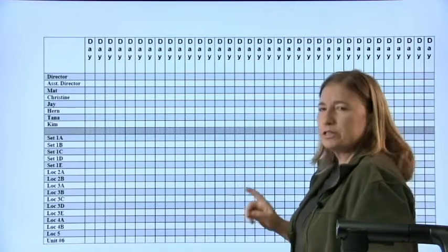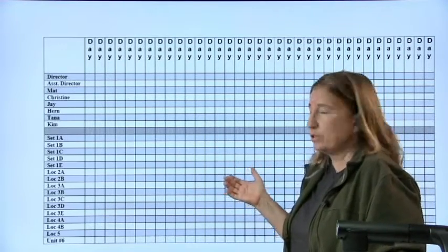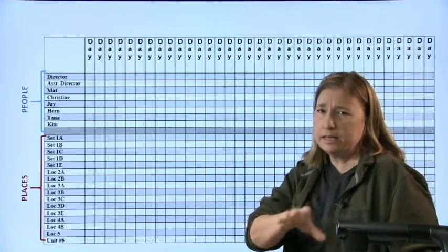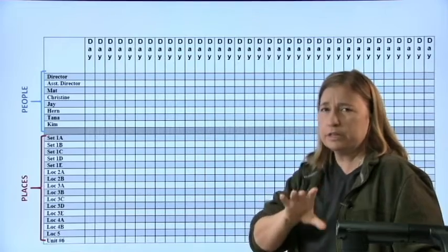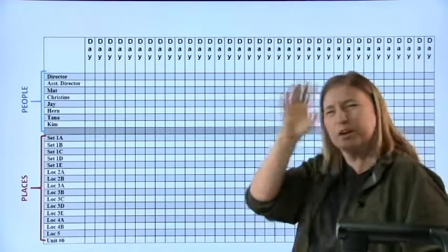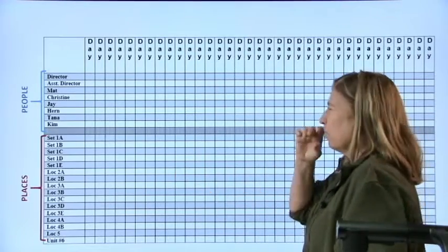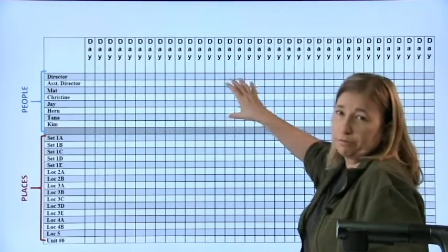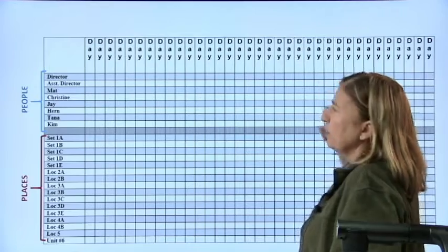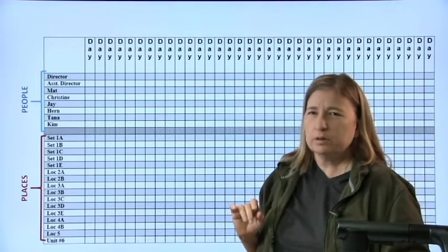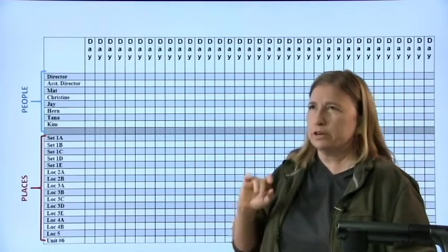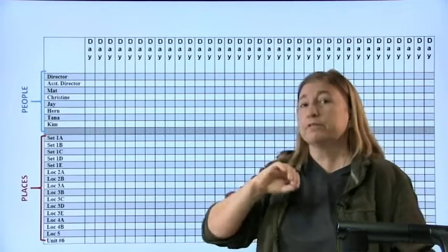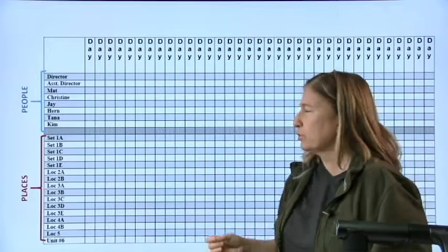A Gantt chart is nothing more than an illustration of timing. There are two key issues here that you do need to keep track of. And right, you already know this, like from going over the story. They're grouped in this free Gantt chart all up at the top: there's the idea of keeping track of the people, making sure that they're not meant to be two different places at once, making sure they have enough time to travel between locations.